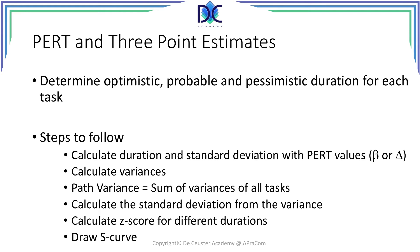From the standard deviations, we can calculate the variances, and the variances are equal to the square of the standard deviations. The variance of the path — the critical path — is the sum of the variances of all tasks. From the path variance, we can calculate the standard deviation of the path by taking the square root of the variance. Depending on the different durations, we can calculate the z-score, calculate the probability, and then draw the S-curve, which links duration and probability.